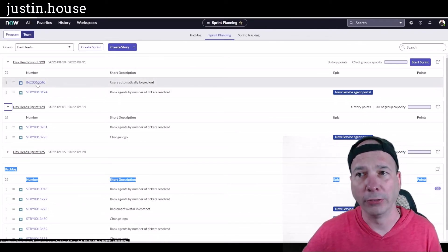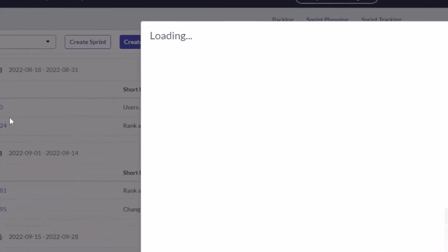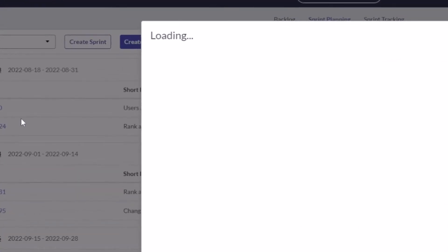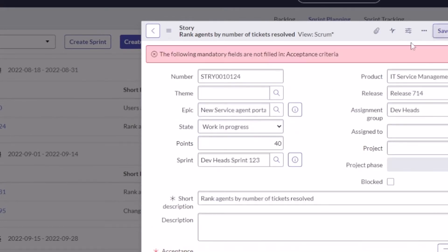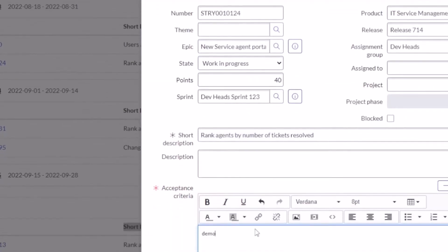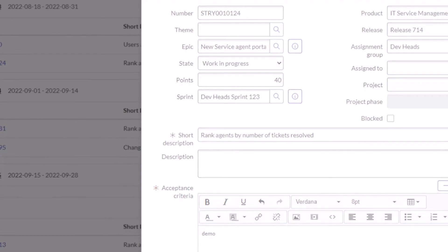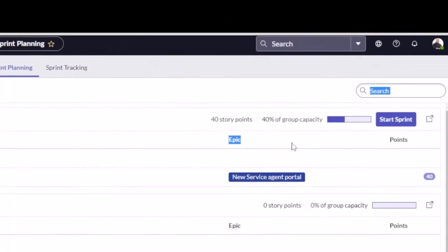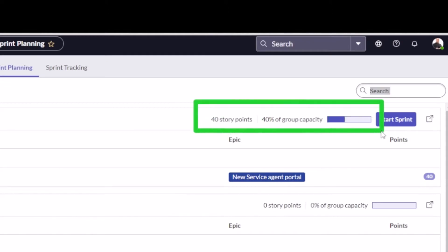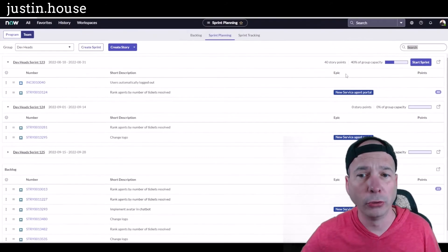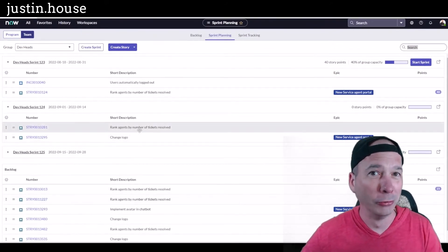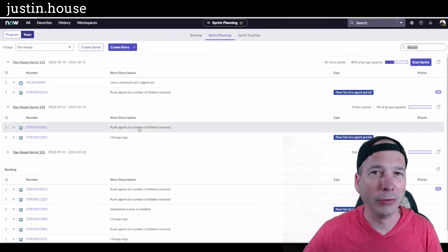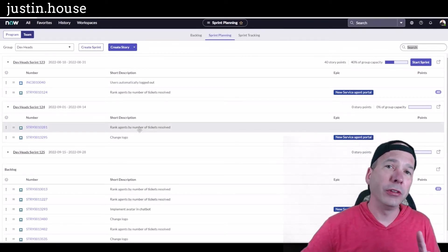I can't see points because I don't have points assigned, but let's open up a couple of these stories. I want to show you the progress meter on the sprints. My capacity was about 100 points, so when I update this story, we'll put some acceptance criteria there too. When I update the story, it's going to change my group capacity here at the top to 40 story points or 40% of my group capacity because my capacity is 100 points. So we got a nice visual indicator of when our sprint's getting too full as you're dragging and dropping your groomed stories into sprints.